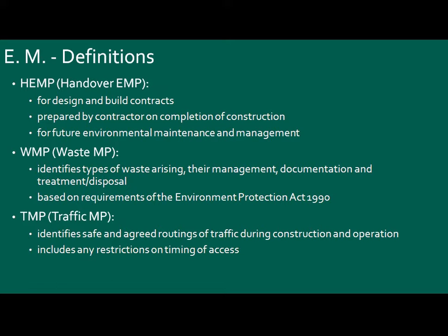They provide you layouts, and that job is over. It is prepared by the contractor on completion of construction. After completion, they will give you the handover EMP management plan, which has to be followed for future environmental maintenance and management. So it is just a document provided to the owners or operators by the contractors at the end.